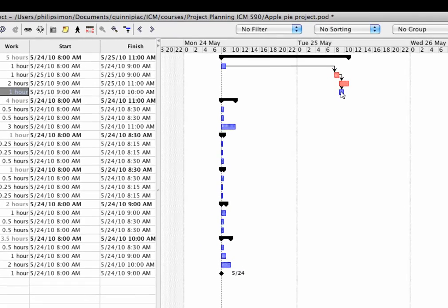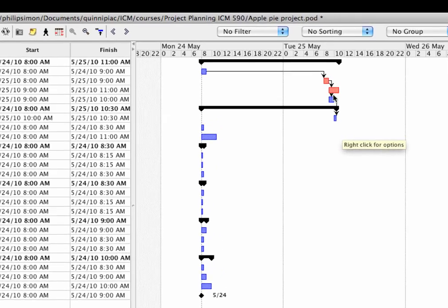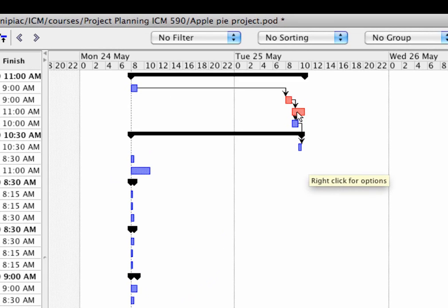So I can actually stretch a dependency line across a milestone, and I'll just drag this to make list, and then you see it puts out the make list task to beyond compare reviews, because that's when I will do that. But notice now that this item here, getting opinions taking 2 hours, is taking longer, so really the dependency is in the wrong place.